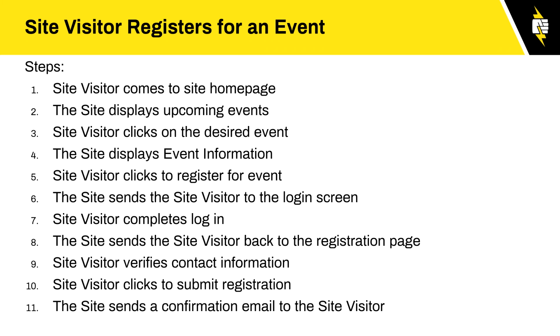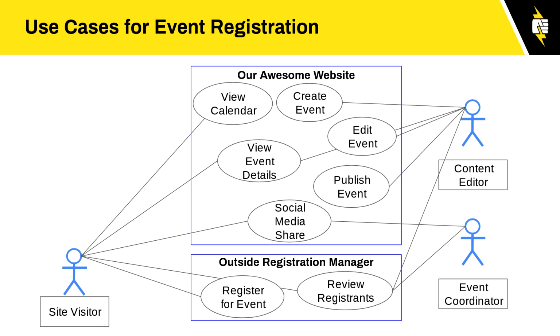And yeah, you have to have somebody along for the ride for all of this to say, that's great that you said that, we're logging them in, great, and we're sending them to the registration page and everything, but back up here, this is using an outside registration manager. Because of the information that we're collecting, and where we're doing our hosting, we don't want that information in Drupal. It needs to be somewhere else. Somebody has to be there to say all of that. And as projects scale and get bigger, those questions get harder.